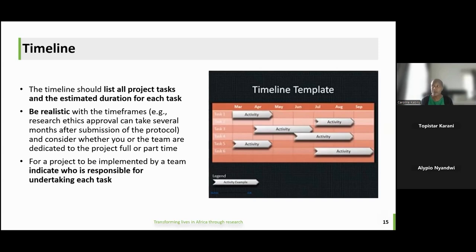Sometimes activities like ethical approval can take several months. So for us, for example, there's a particular ethical approval within a hospital where it can take 6 months. So it also helps you bear in mind whether, say, someone is telling you, please apply for this funding opportunity, but we only have 6 months. And then you see, I have to get ethical approval. It might take the 6 months. So you're saying that I think then we need to be flexible about the project period.